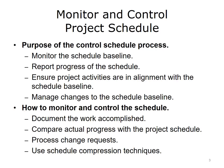Corrective actions may include bringing in more resources, also known as crashing, and doing more work in parallel, which is usually referred to as fast tracking. These techniques may increase project costs and project risks. Preventive actions are recommended changes to the system or process that will prevent future schedule variances.